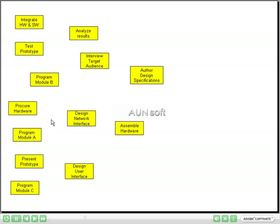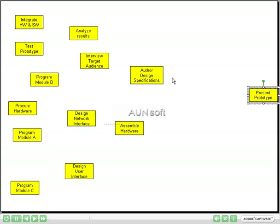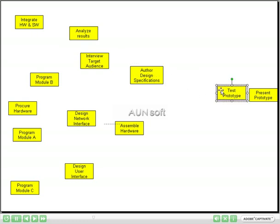Now, we want to start with the last task to complete and then work our way forward to the first. The last thing we are going to do in this project is present the prototype. So I will drag the yellow post-it 'Present Prototype' and place it at the far right of the screen. Now before we can present the prototype, we need to have tested the prototype, so I will take 'Test Prototype' and drag it into position.